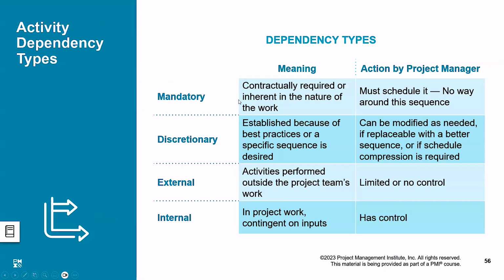Now, when you have activities A, B and C, maybe you can do the activities in parallel or one by one. When I say the activity is mandatory, it means without activity 1, you cannot start activity 2. Yesterday I was telling you, if you have to do painting, the first activity is plastering, and the second is painting.